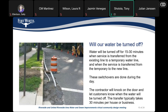Some frequently asked questions: Will the water main be turned off? Typically water will be turned off for about 15 minutes when service is transferred from the existing service line — which we're going to dig up and replace — to a temporary water line, and again when service is transferred from the temporary line to the newly installed line after it passes all necessary tests. These switchovers are typically done during the day. The contractor will knock on the door and let customers know when water will be turned off.